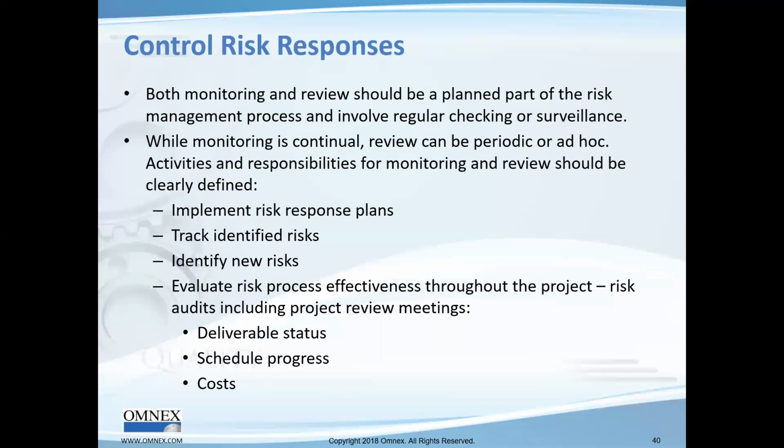Either it's in the FMEA or it's not. If it's in the FMEA, well, then we could look at what did we say we're going to do to prevent it or control it, detect it. If it's not in the FMEA, then we need to say, should we have known? If it's something we should have known, then we end up with a management problem, because management has a responsibility to assure that the FMEA is done efficiently and effectively.